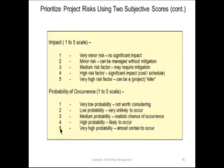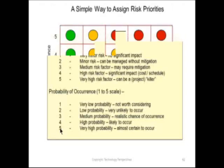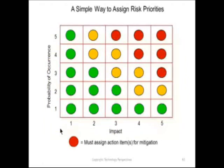So if in the beginning, scoping out a project, and if you identify the risks early, it might tell you this is not a project that we think is viable based on the risks. It can help you avoid going down a path where you're putting money, resources, and time and effort and customer satisfaction at risk. So graphically, obviously 1 times 1 is 1, and 5 times 5 is 25. Anything that's out in this upper region, you'd seriously consider maybe not going down that path with that design or that service or new product development.